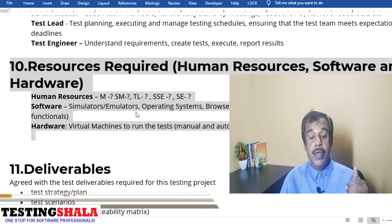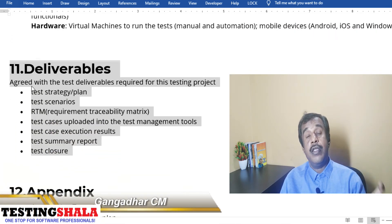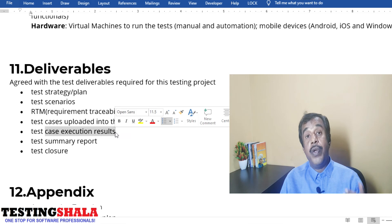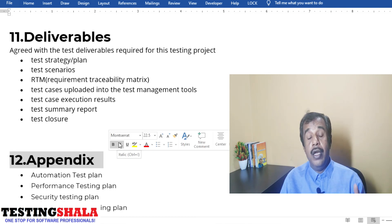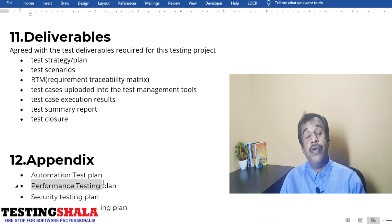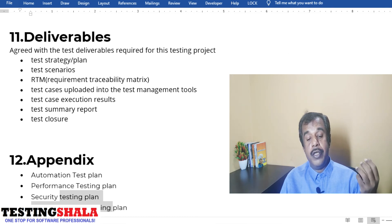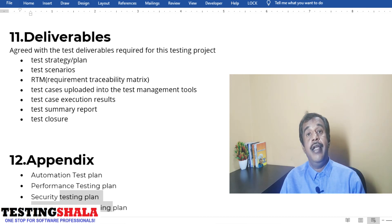Section eleven covers deliverables — what documents and outputs will be provided as part of this project. Clearly document these and hand them over once testing is done. You should also have an appendix section for documents that cannot be accommodated in the main document — such as the automation testing plan, performance test plan, security test plan, and user acceptance test plan. These are typically done by different experts.